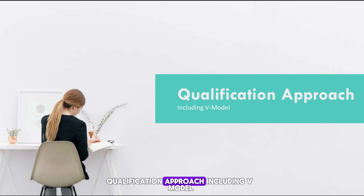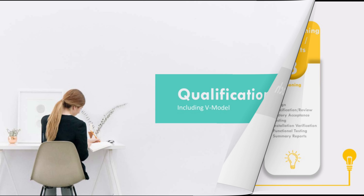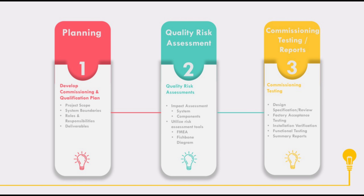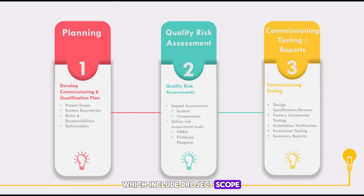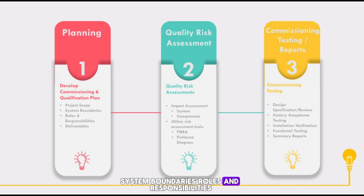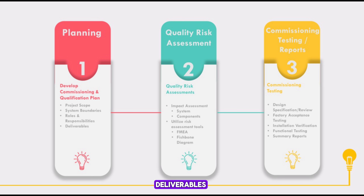The Qualification Approach includes the following model. Step 1 — Planning: develop a commissioning and qualification plan, which includes project scope, system boundaries, roles and responsibilities, and deliverables.